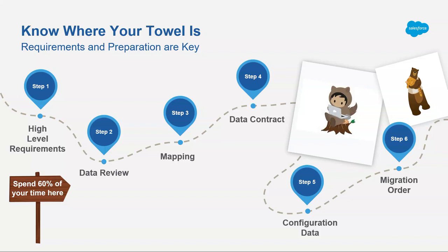But the one note I'd like to make about that, and something I've started to do over time, is even though the client is signing that document and saying, okay, here's the scope of our project, along the way you're gonna find things you forgot to deal with, the client's gonna have change orders, development's gonna have questions, and so for me, this is a living document. As we're going through development, QA, UAT, I'm making notes on these documents about any of the adjustments we've made, and also the date and why we're making that adjustment, so that by the time we get to QA, we have a solid plan for testing that's all up to date with any of the changes that we've made.